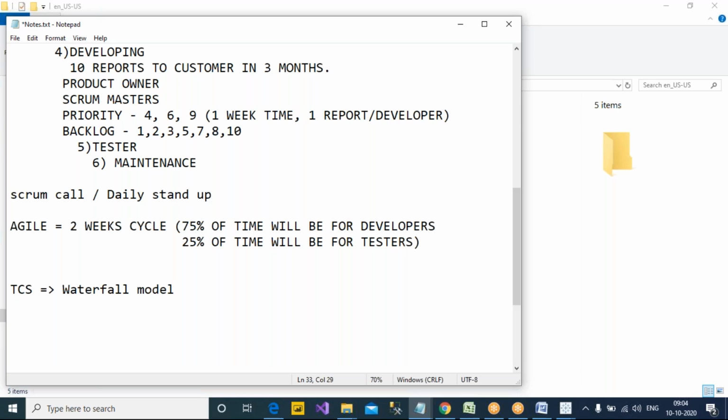So what you do in this is, every Tableau developer or every developer will join this meeting. This will be conducted by your manager or your lead, and then you have to say your status: what you are doing today, what you will be doing after the call, what you will be doing tomorrow, and whether you have any challenges.